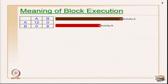Since there is no relationship, activity A and activity B are to be done in parallel, with no rework shown. What is the duration for this particular block? Activity A duration is 12, activity B duration is 8 - I have used a bar chart for showing this. The duration for this particular block comes out as 12.